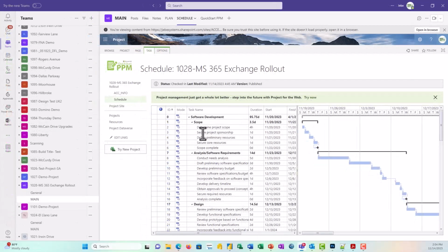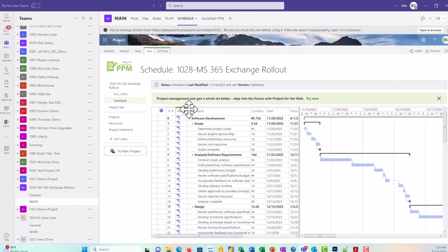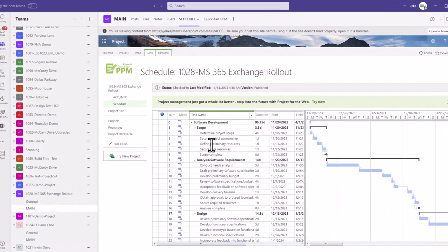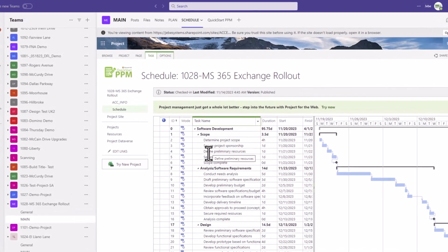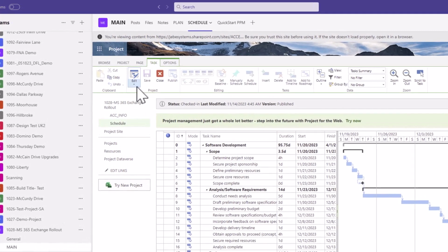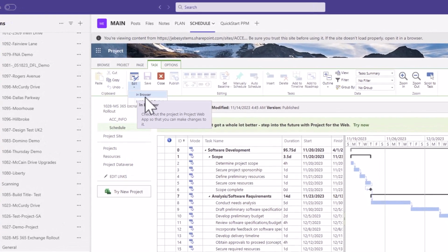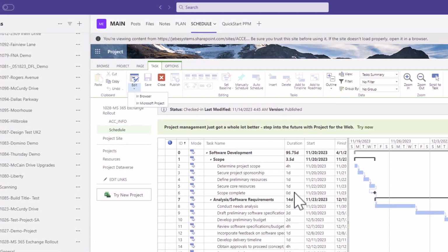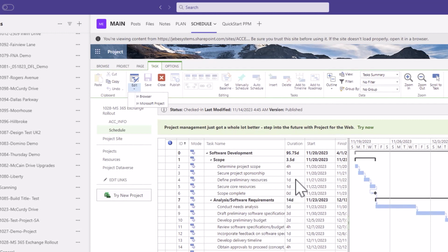An important part of this type of setup is that you can have users running the Project Essentials license, and they can get access to this part of the schedule, check it out and make updates to it, whether it's an assignment, changing the duration, changing the scheduled start date, or what have you. They can save it and publish it back without needing that P3 license.